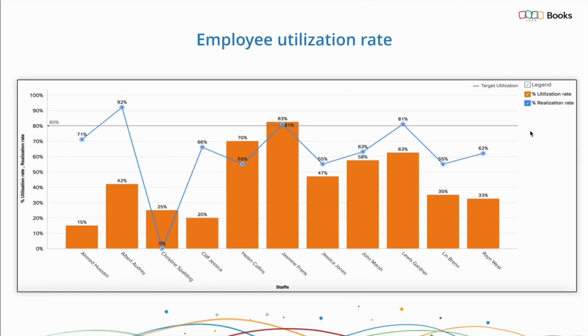In addition to the above, let's also look at a particular report that we can get from Zoho Analytics, like this employee utilization rate. This metric is derived from the timesheet details report we have. This can tell us how many hours a user is spending on a project at a particular time. This helps us in allocating resources and also helps us identify the right skill to hire. In case we get a new project to work on, we can look at this report and find out which of my resources are free to work on another project.